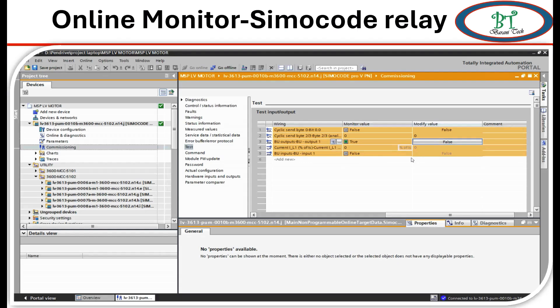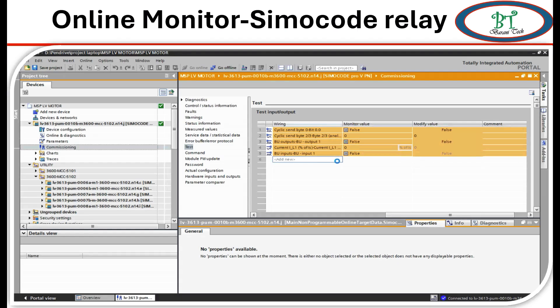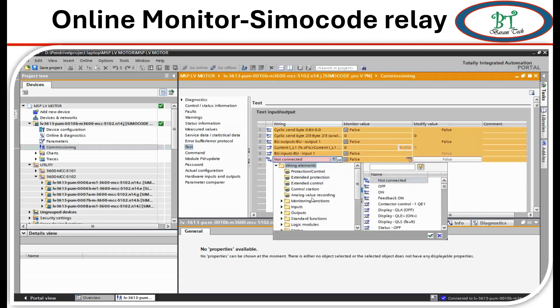Once again, I would like to clarify this. This is a simulation from the relay end. We can simulate only the signals which the relay gives as output. For relay input, we cannot simulate.